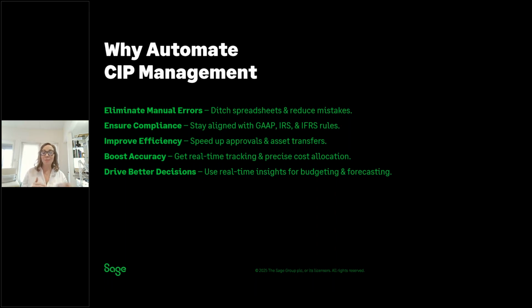Most of them are adopted from turnover. And if someone has a new project, they say, well, let's just take a copy of this last project template, I like to say, in a spreadsheet, and save as and just redo it. But what happens a lot is that if a formula was already wrong in the first project, it's going to be wrong in that one, and the next, and the next, and the next, right?